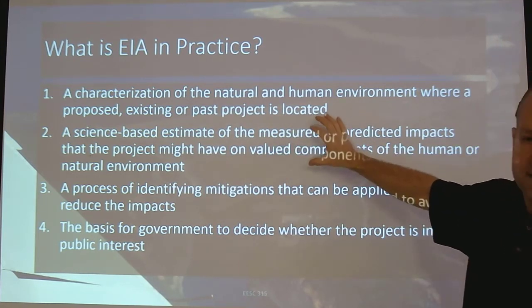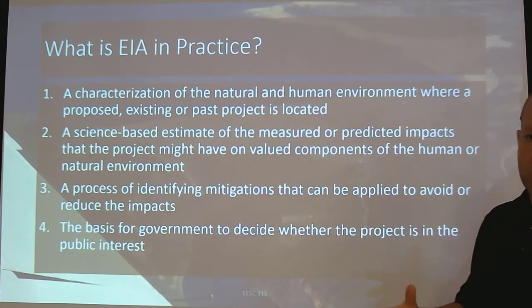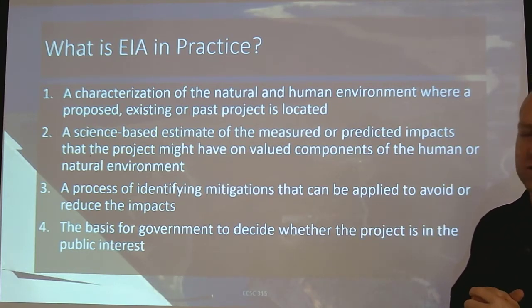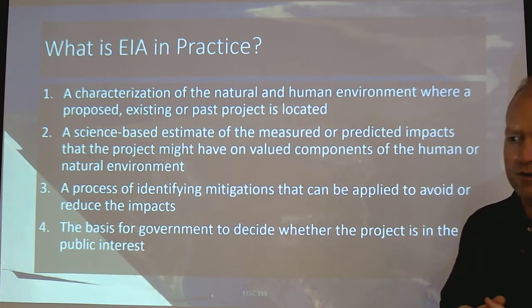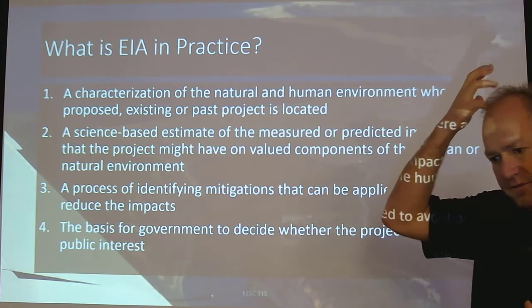If I find that a project is going to have an adverse impact on some valued component, I would then go to the proponent and say, look, this is probably not going to be an acceptable level of impact. Let's come up with some sort of mitigation so that you can reduce the impact on that valued component, and then we'll reassess it. And so this can be highly iterative.